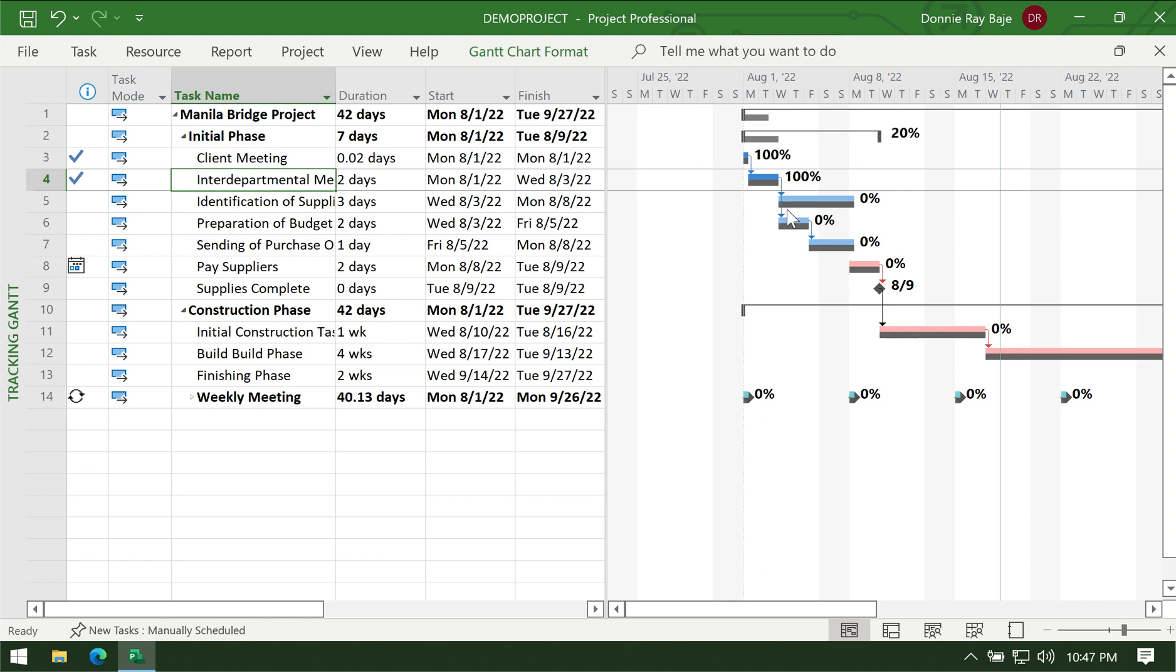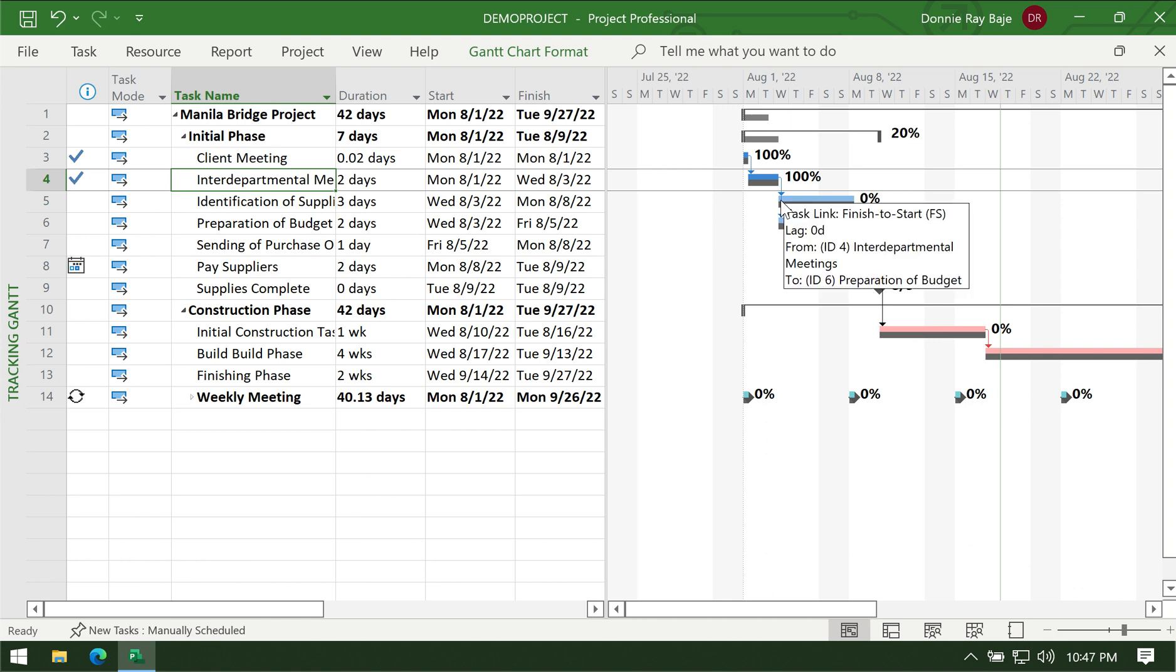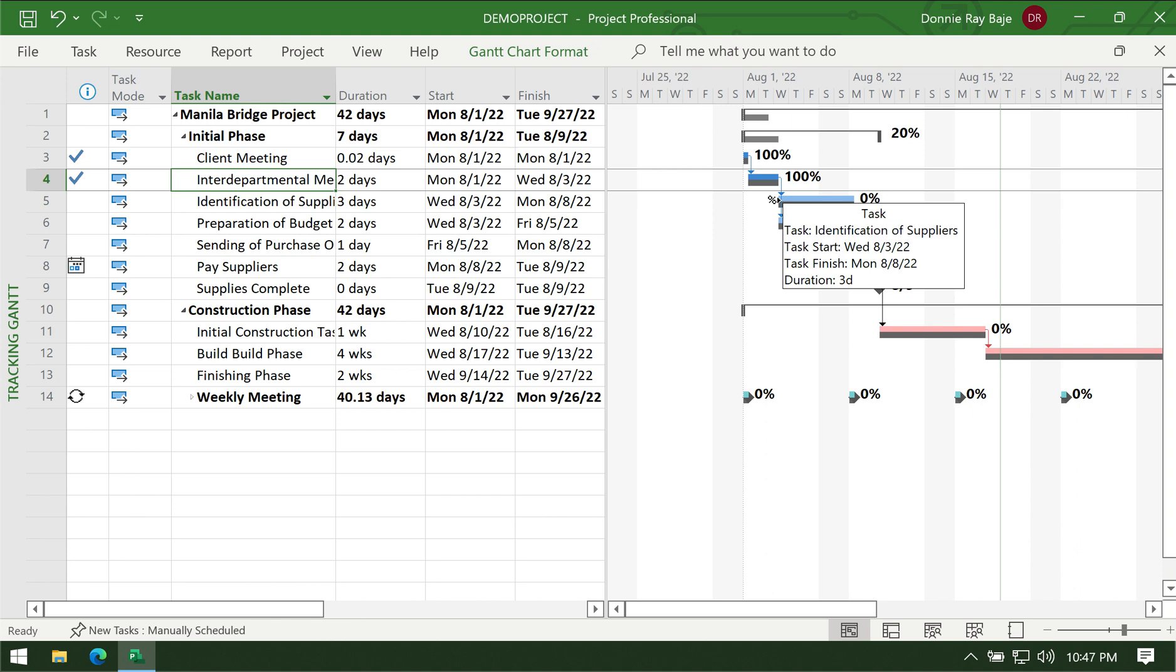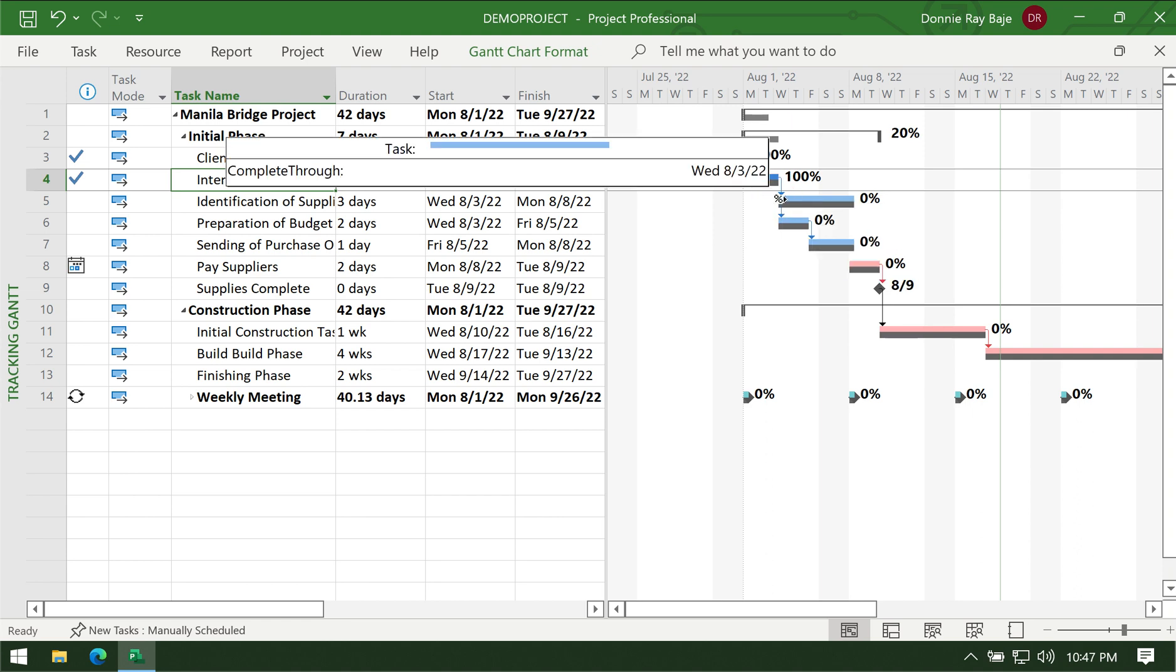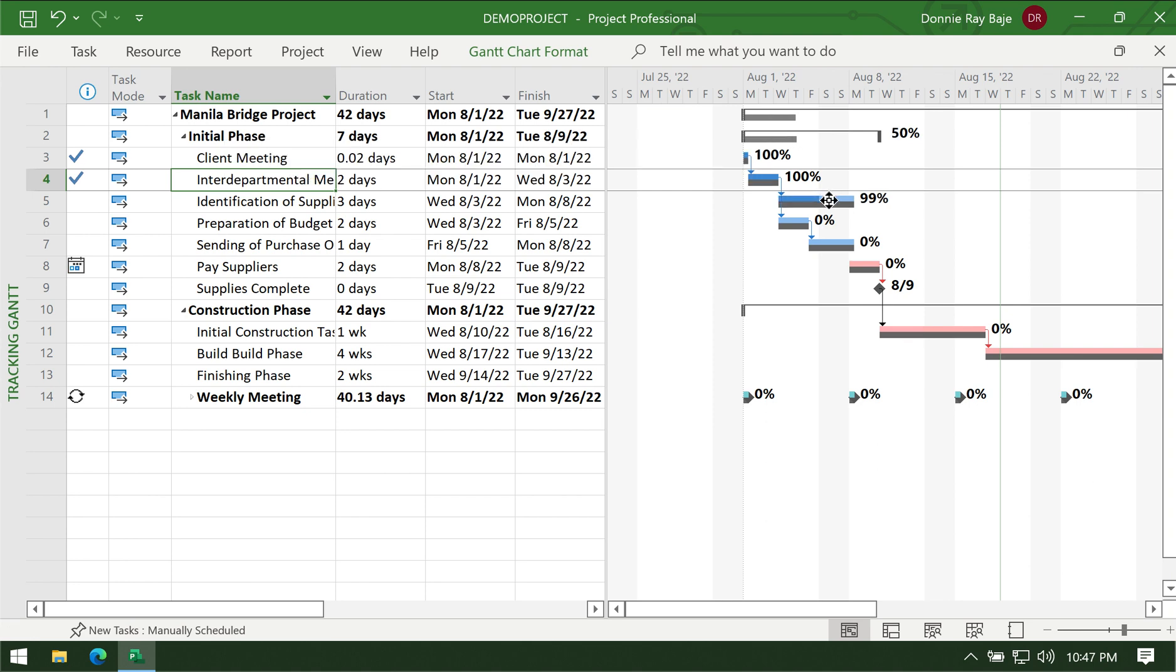You will also notice that the blue color is a little bit darker, so this signifies that the task is already complete or the percentage of that task is already completed. Now another way to update tasks is by going through the Gantt chart bar itself, and then you can actually put your mouse over the blue bars and drag to a certain portion.